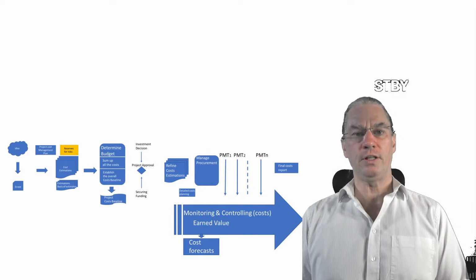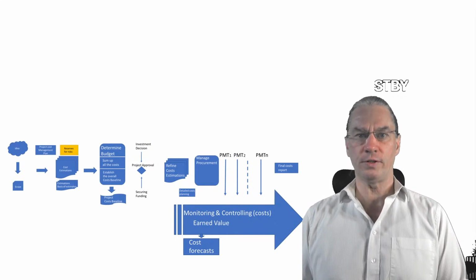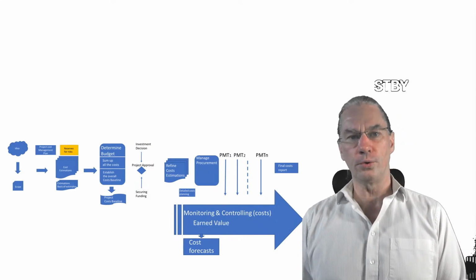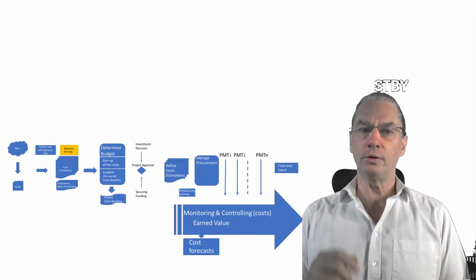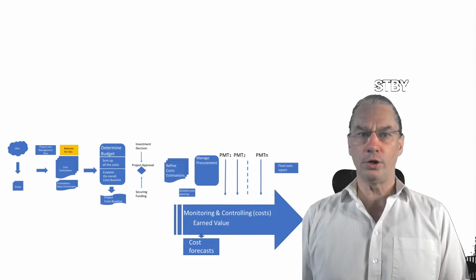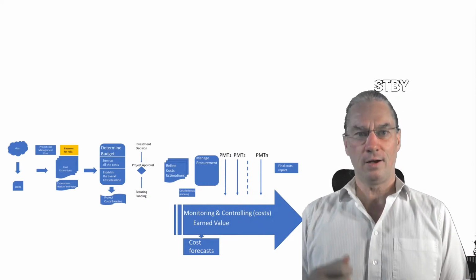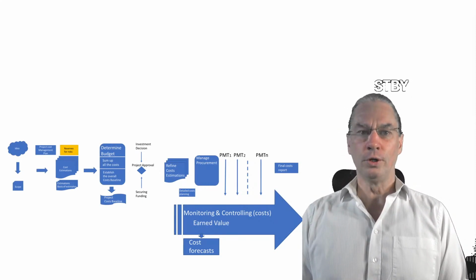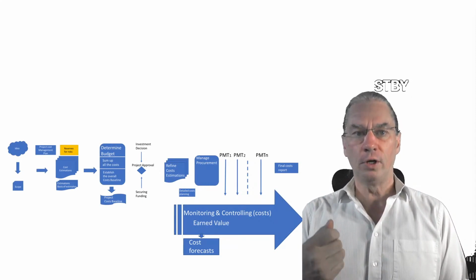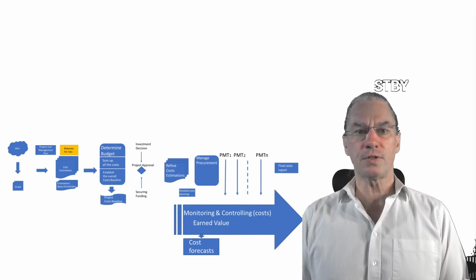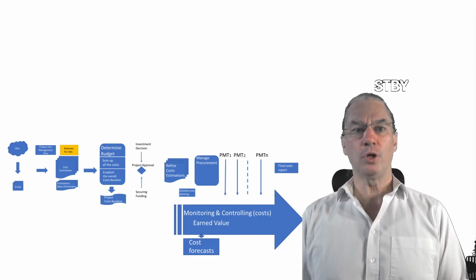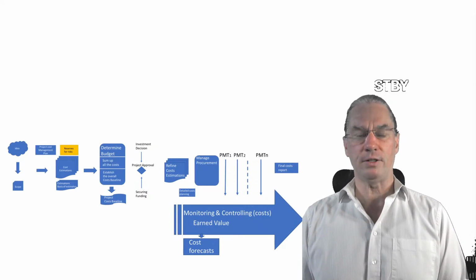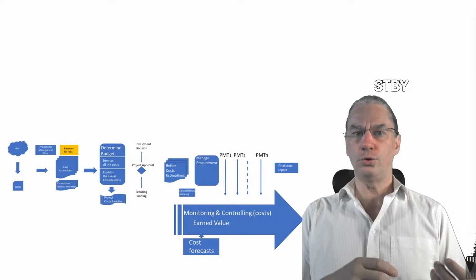If you aren't, there is one important thing I would like you to notice here: you cannot be accountable for the cost performance of this project. This has to go to the person in charge of controlling the costs. In the case that I described earlier, this is, for example, the department manager. It can be on the user side.